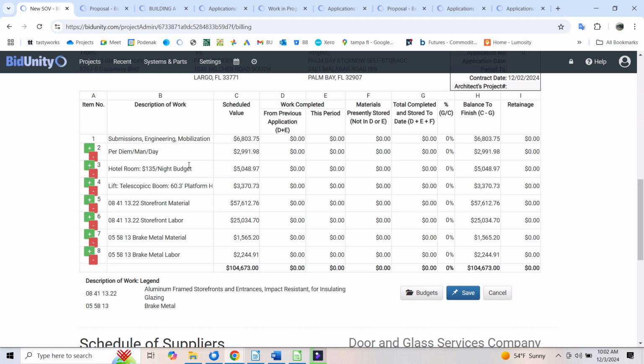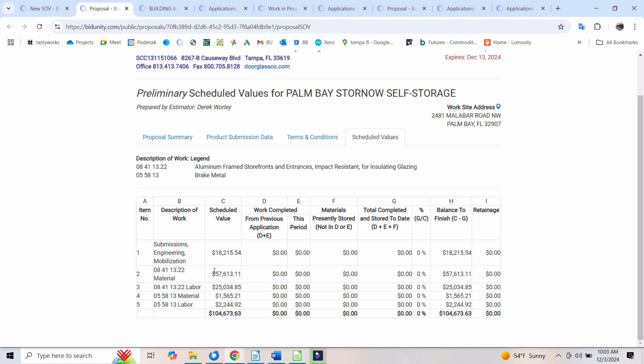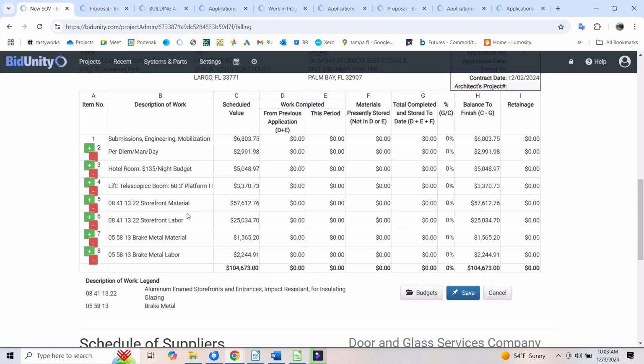Our general contractor customers have a responsibility to make sure that the funds for the project are properly applied and used in the performance of the project. They don't want to pay somebody $1 million and then that person just disappears. So they want to see work on the job, and then they want to make a payment for that work. And that's what we're trying to structure. But we really haven't received any kind of commentary regarding a difference between this and whatever we end up with eventually.